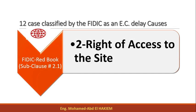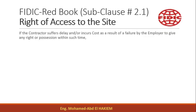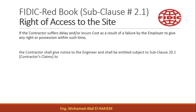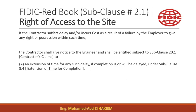Cause 2 – Right of Access to the Site. If the contractor suffers delay and/or incurs cost as a result of a failure by the employer to give any right or possession within such time, the contractor shall give notice to the engineer and shall be entitled subject to subclause 20.1 (Contractors' Claims).